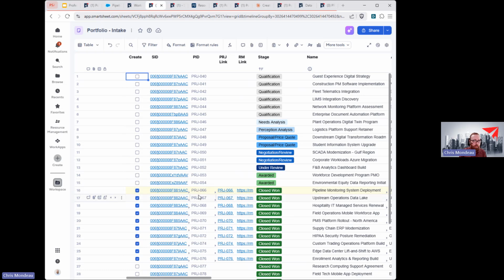But just to kick off that template itself, there's a couple ways I can do that. In this case, I'm just having a manual trigger to say, create this project flow, but it could very easily be associated to the stage in my CRM. So as soon as an opportunity makes it to closed won, that can kick off the blueprint to actually provision it. Or you can create a much more advanced approval process where you're managing the initial kickoff and handover between sales and delivery, and then the delivery team can check that box.